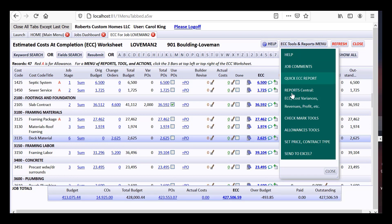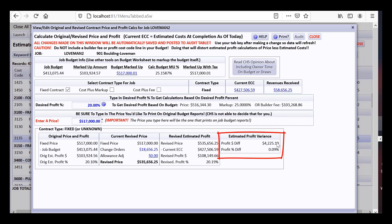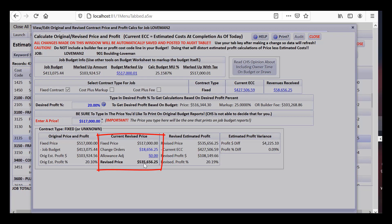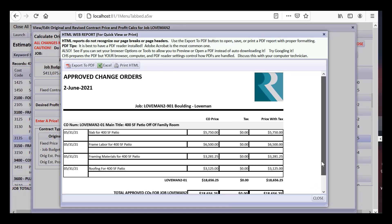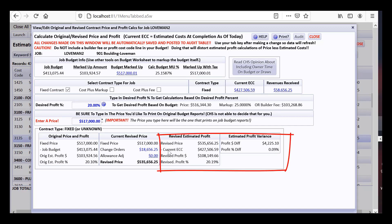Going to ECC Tools and Reports — Set Price Contract Type — you can see that profit is increasing. The fixed price plus the change order price charged to the customer gives a revised contract price. Less our current ECC gives a revised profit. Our profit difference is heading up by roughly $4,225, which is the ~$3,731 from the change order markup plus the ~$494 we were already going under on estimated costs.